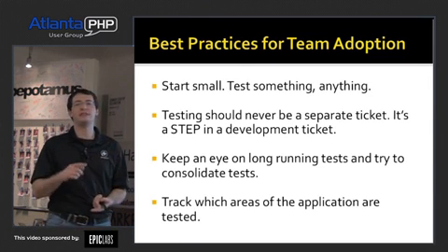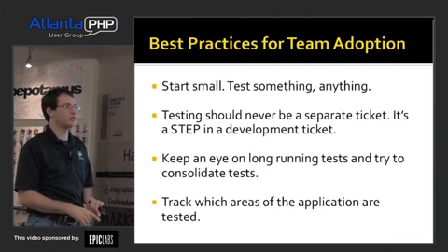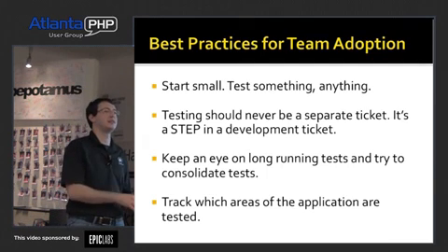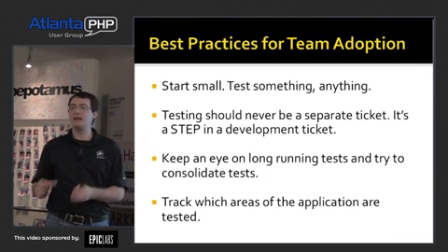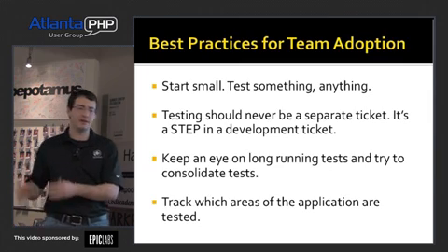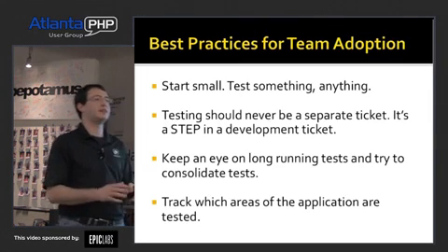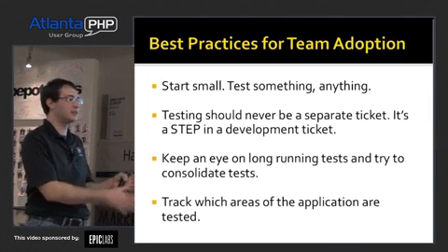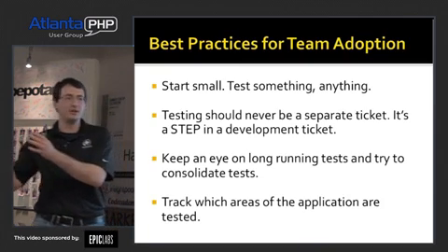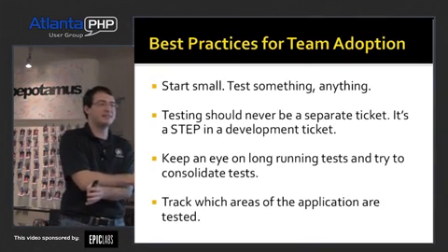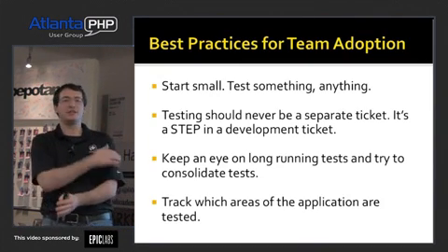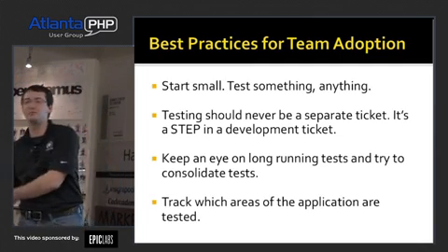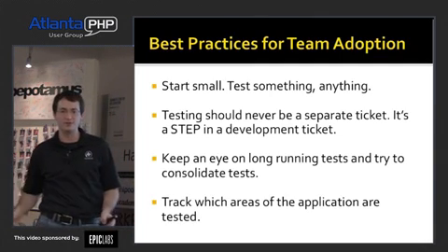For the people who say, I don't have time to test, there's a little trick in terms of getting testing time. A lot of people look at testing as a separate activity from development. You can't do that. You can't have a ticket in your system that says, write code, and then another ticket that references that and says, write tests for said code, and then another ticket that says, write Selenium tests for said code and test on all browsers.